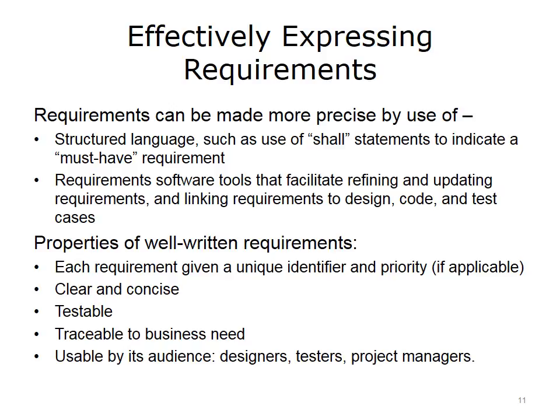As you express your requirements, keep in mind the properties of well-written requirements, keeping them clear and concise. Requirements should also be testable. The acceptability of systems and services will be based on matching those systems and services and what they do against the requirements. The requirements should be traceable to the business needs that first appeared in the project charter, and the requirements should be usable by everyone, including the designers, who will be designing systems based on the requirements, and testers, who will be using the requirements to come up with test cases.